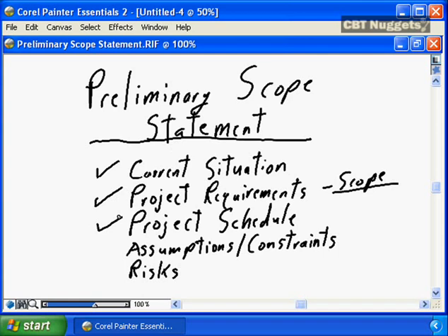Based on experience in my organization, a project of this magnitude would take 3 months in analysis, 6 months in design, 10 months in development. Based on my experience, or based on industry experience, or based on estimating parameters I have gotten from the internet, or from trade periodicals, or from your project manager's toolbox, you're going to develop the preliminary project schedule that says phase 1, 6 months.